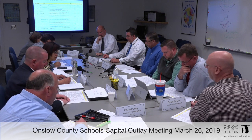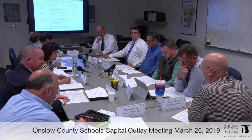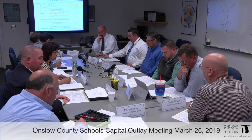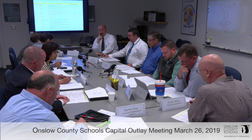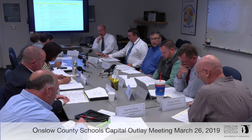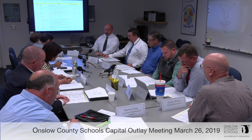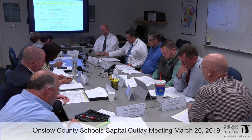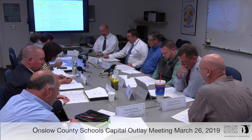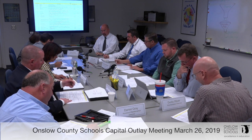The lighting that's predominantly there is from the 60s still, and we have a lot of complaints about just not enough light in the classrooms. So once we do that, we would put in the ceiling, insulate it, so it'd be more efficient. So we need to do the first one, remove the pipe insulation and re-insulate, before we can do the ceilings. So that's an instructional need request. It all accumulates into a structural problem because it's all in good condition now as far as the pipe insulation. Okay, so that'd be four. Put 4B.